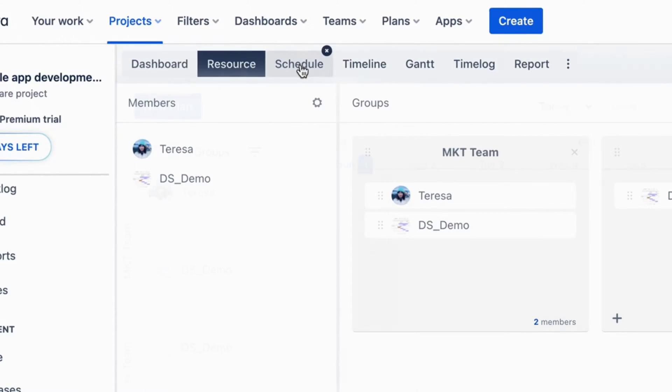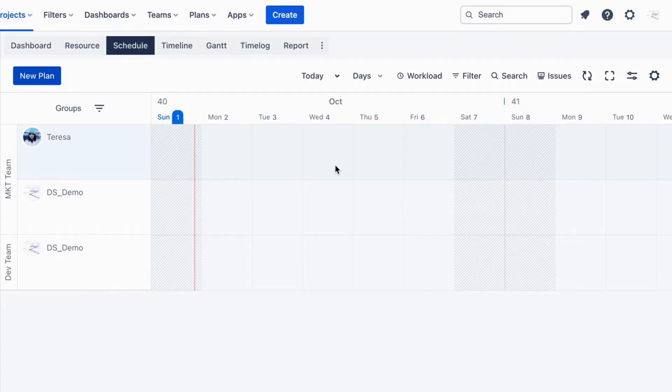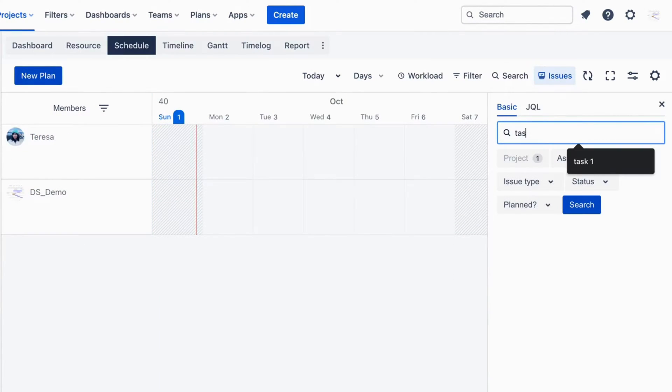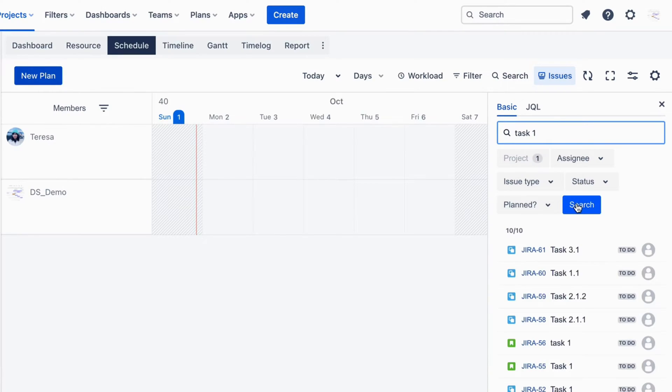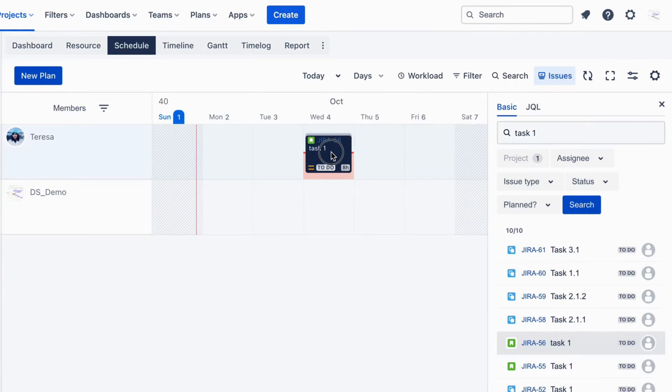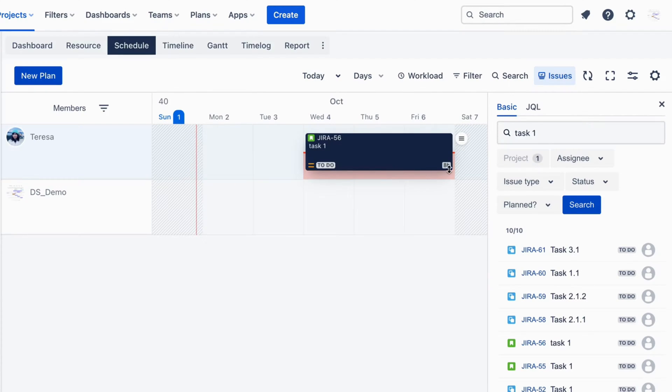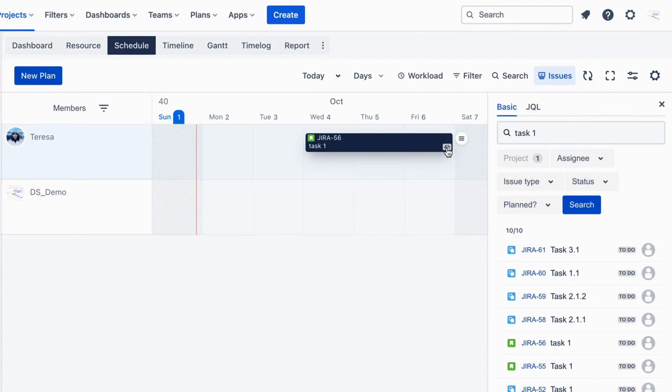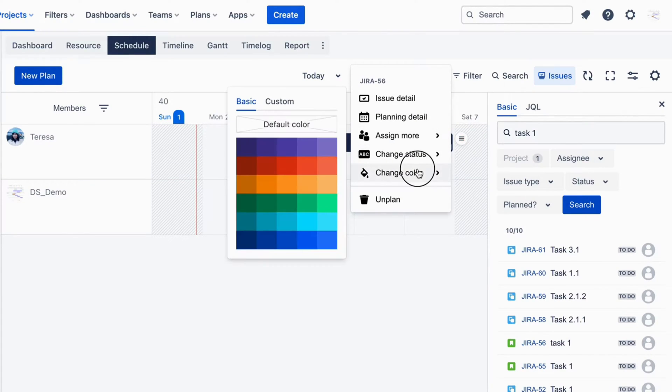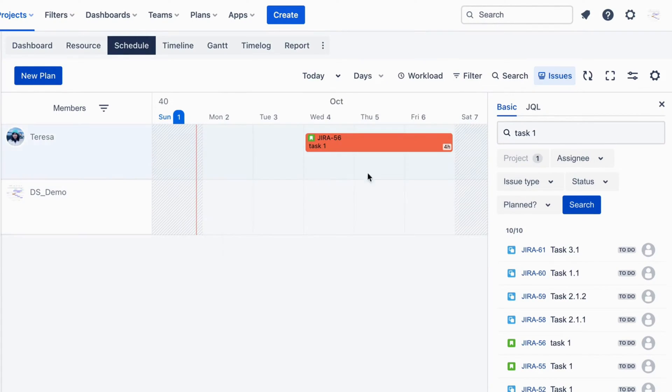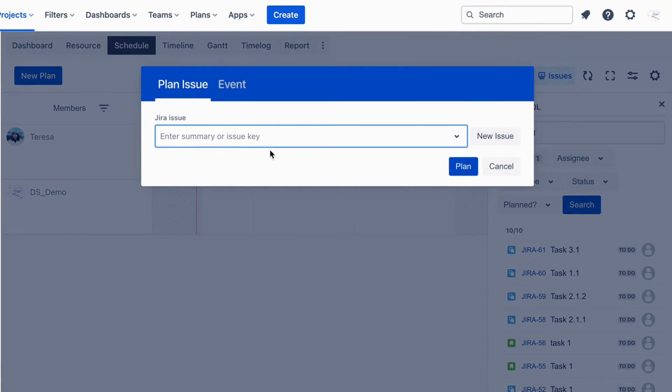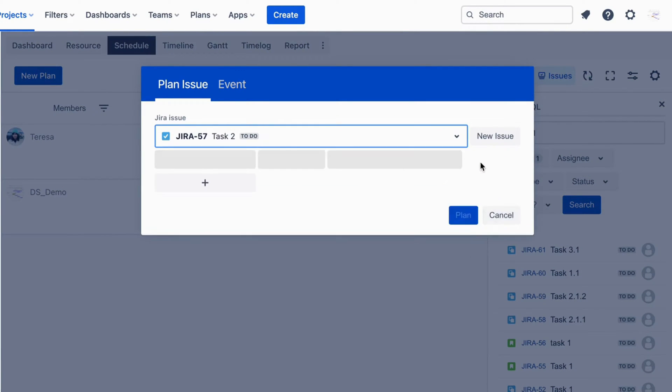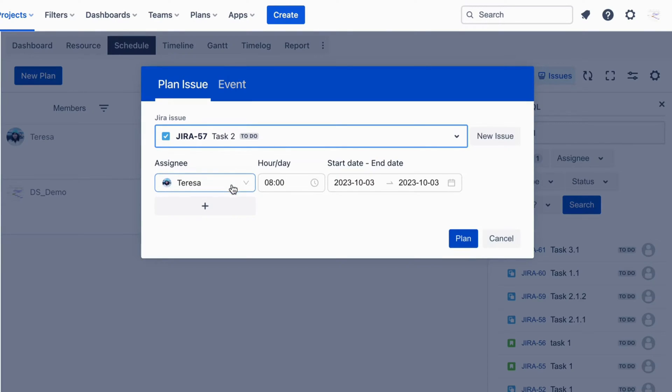Schedule resource. You will see a list of resources individually or in groups on the left and the issue box on the right. Plan issues or events for resources utilizing the intuitive drag and drop function. Resize cards to adjust the plan, ensuring accuracy in task scheduling. Here, assign the tasks related to the mobile app project to Teresa and adjust the plan efficiently.